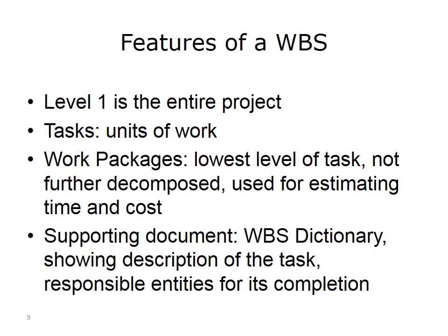There's a lot of detail associated with all these tasks and work packages, so you'll want to create a supporting WBS dictionary, which will have more detailed information about all the tasks. For example, it will include who's responsible for the completion of the tasks. Remember that every work package is a task, but not every task is a work package. A task can be at different levels of detail, while a work package is characterized as being a task at the lowest level of detail.